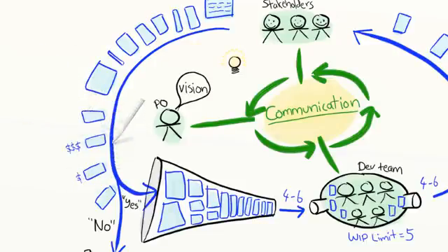Like here, these two stories are roughly the same size, but have different value. So build this one first. And over here, these two stories have roughly the same value, but different size. So build this one first, and so on.